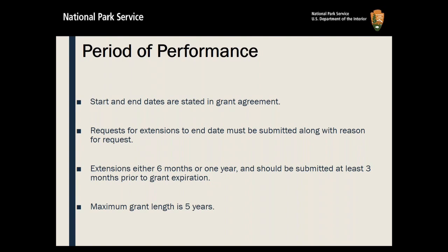And very important to keep in mind that the maximum grant length is 5 years. So after 5 years, that funding has to be returned to the Treasury. So if you're coming up anywhere close to that, make sure that you're planning ahead and looking for ways to complete that grant within 5 years, or we unfortunately lose that funding.